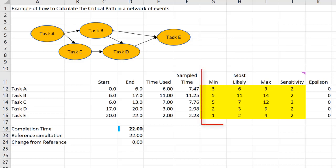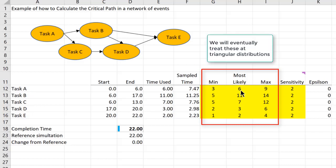We've assessed a range for each one of these activities. Task A has a most likely of six with a minimum of three and a maximum of nine, and you can see the other parameters here as well.